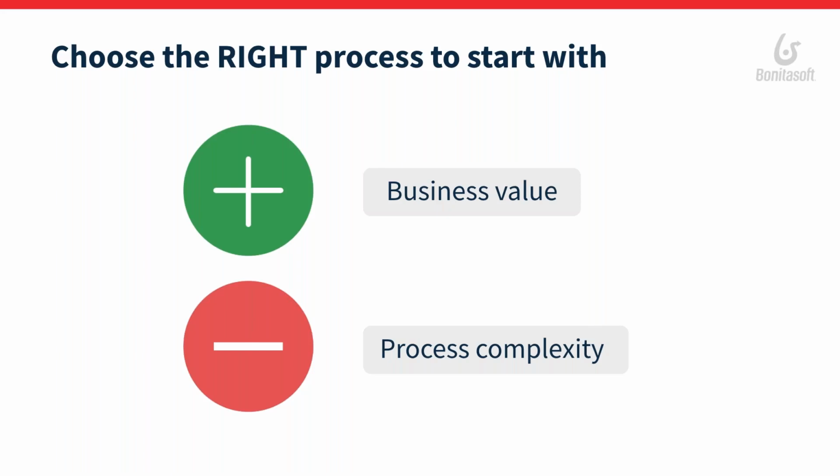For example, Kai, do you have an example? I would say 10 to 15 tasks at the beginning, maybe. Yeah, that's a good rule, and you're absolutely right. So balance is key, and it's not easy. Usually there's a rule to not exceed a maximum of 12 tasks for an initial process. That doesn't mean you're not able to create additional processes and additional tasks or sub processes, right? But try to limit yourself, looking at the process complexity, to a process that doesn't exceed some 12 steps at most.